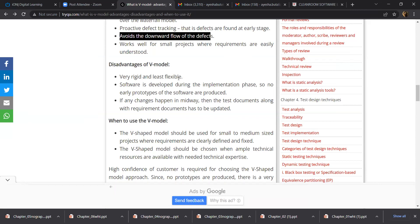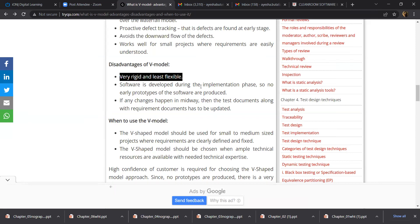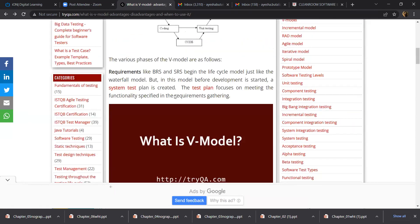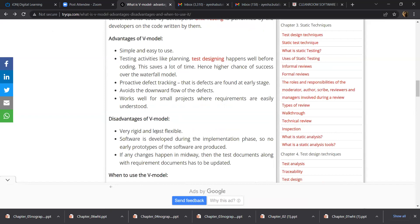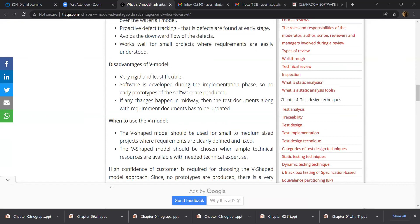As for disadvantages: V-Model is very rigid and least flexible, because at every phase there are a lot of interconnections and dependencies, giving you less flexibility. Software is developed only during the implementation phase, so early prototypes of the software are not produced. You may get to know design defects at a later stage. If any changes happen midway, then test documents along with the requirements have to be updated — this becomes a significant drawback.